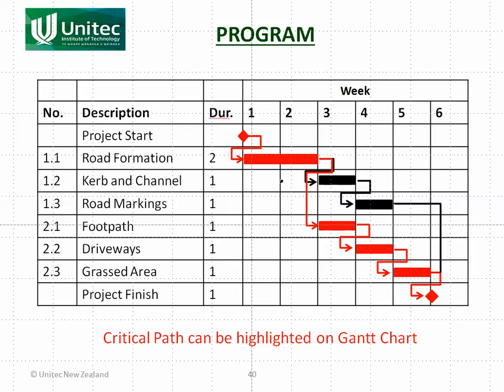One other thing you can show on here is the critical activity. You can show it as a different color, so you don't just use the spatial set out, you can also use colors and say, well, the stuff in red is the critical path. You can then use this to determine, okay, well there are my important ones there.